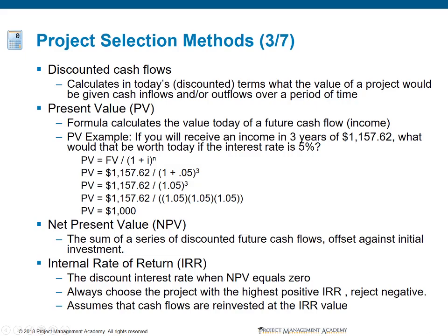With present value, this is where we will calculate the value in today's money of a future cash flow, which would have a lower value. The theory behind this is that due to inflation, which is just a fact of life in our economic model, today's money will always be worth more than any future money. So we're basically doing a currency exchange. It's almost like flying to a foreign country and swapping out cash. We're saying how much is that money worth in our current money.